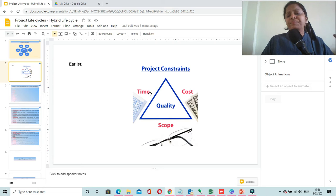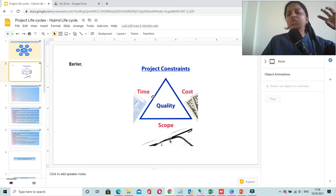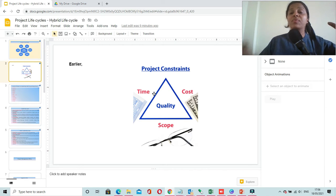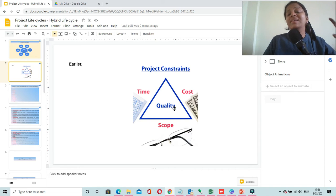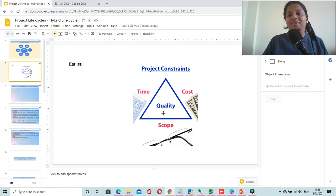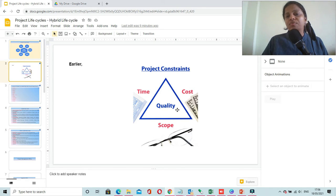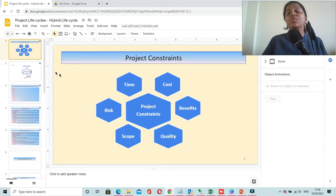If you try to complete your project in the shortest possible time, or compress the schedule without tweaking the cost and without compromising the scope, there is a possibility that your project's quality might get impacted. This triple constraint triangle has evolved and now we have six constraints to manage in our project.